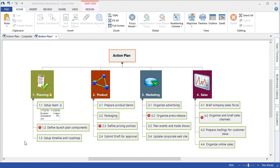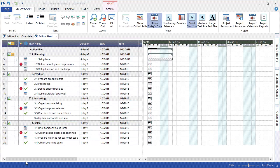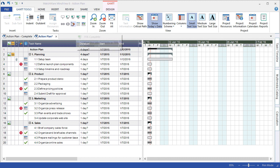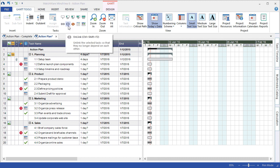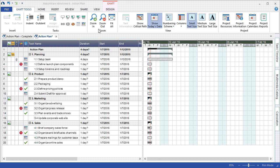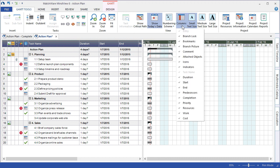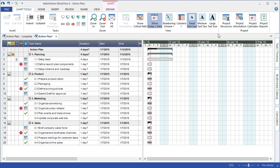For those users more comfortable in scheduling in the Gantt Chart view, you can navigate directly under Views to the Gantt Chart and do your scheduling from the Gantt Chart view. Once in the Gantt Chart view, under the Gantt Tools tab, you can choose to associate several various features such as indenting and outdenting to change the outline format, completion levels, linking tasks, active and inactive tasks, zooming in and zooming out, displaying the critical path, even determining what columns to be displayed in the outline. I also have access to the same project requirements such as resources, information, calendars, and more.